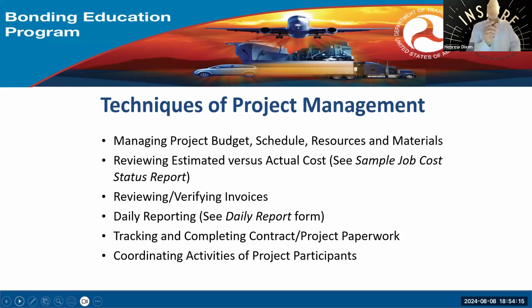It documents that a form typically has who's on the job, what trades are on the job, what the weather was like, what was delivered, what came with the delivery, who delivered it. Those kinds of things are on that, and you have that every day.